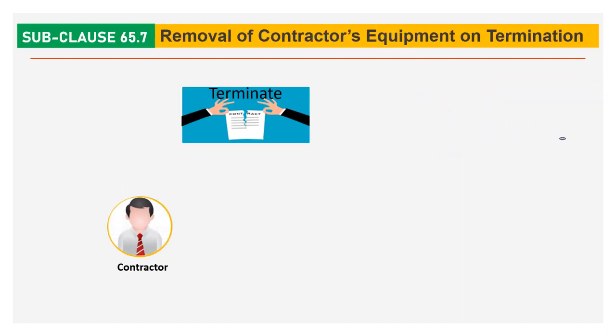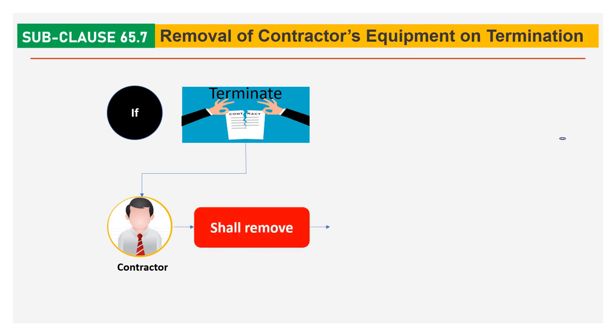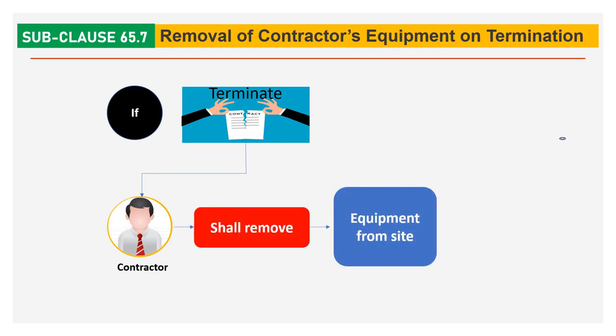Sub-clause 65.7 Removal of Contractor's Equipment on Termination. If the contract is terminated due to an outbreak of war, the contractor shall remove equipment from the site immediately.